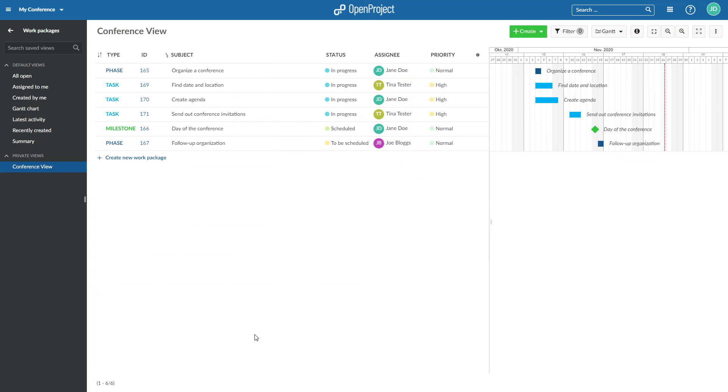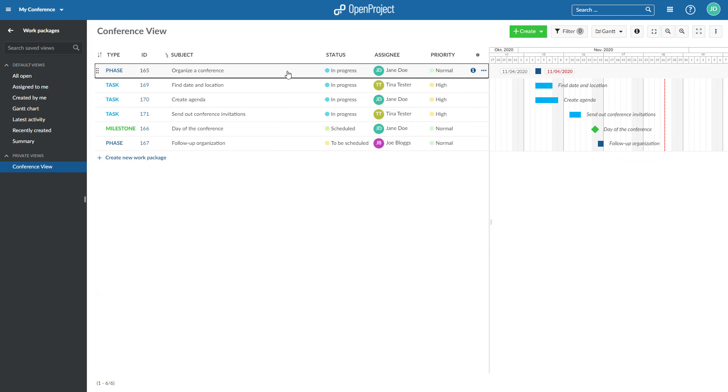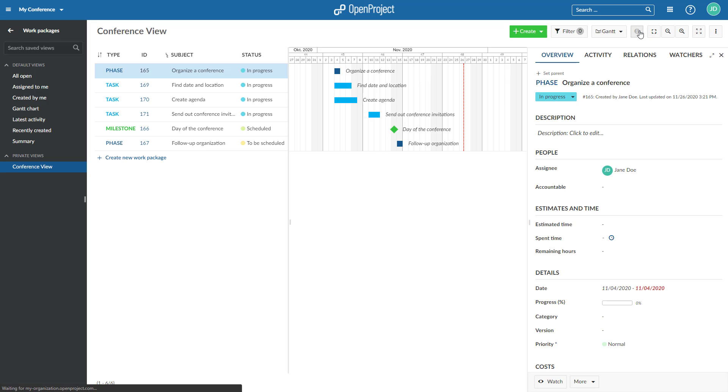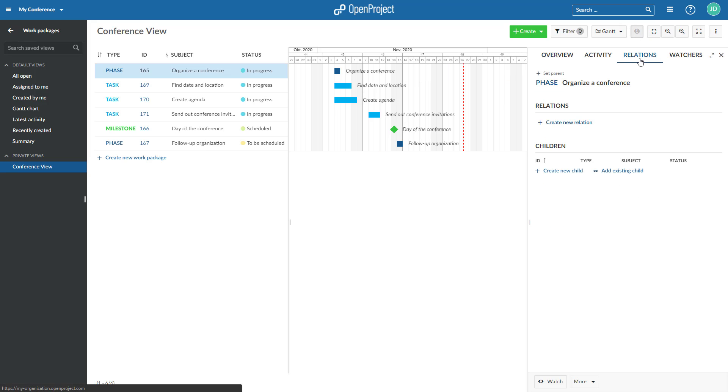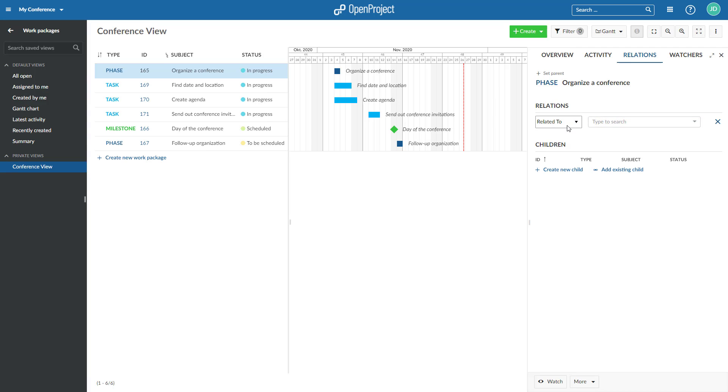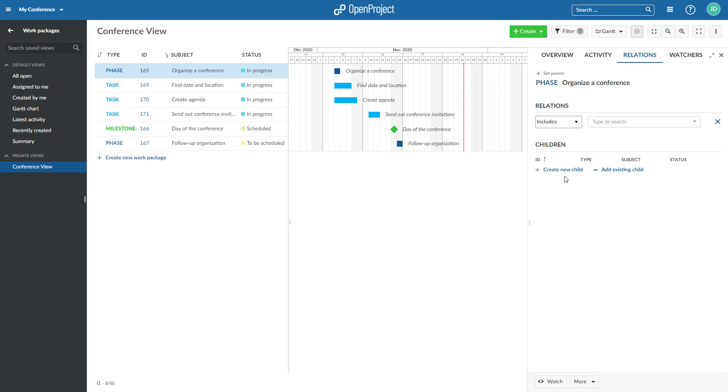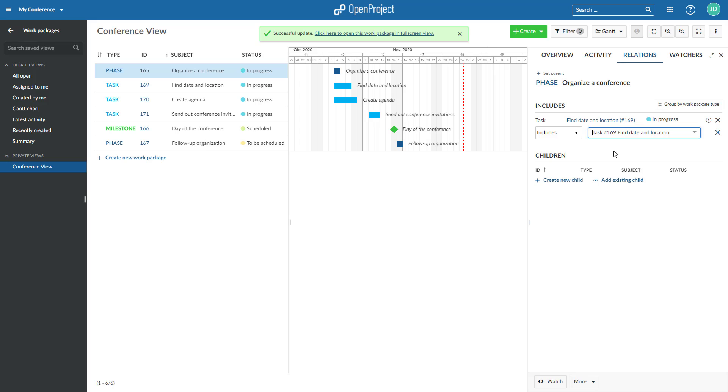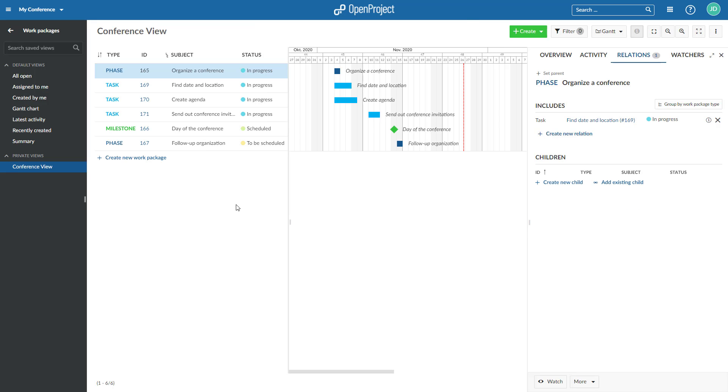To create a relation between two work packages, select a work package, click on the Relations tab and click the Create New Relations link. Select the type of relation from the drop-down menu which you need. Enter the ID or the name of the work package to which the relation should be created and choose an entry from the drop-down menu.